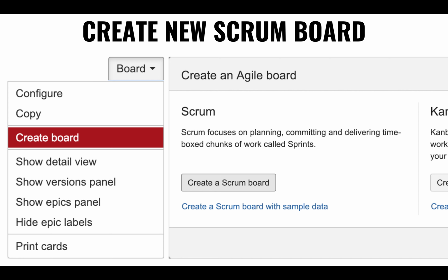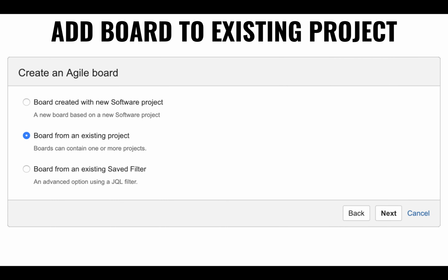Whereas Kanban is more like a flow, that as you're done, new things can come into the flow. You don't time box and say, I only have 1 or 2 weeks. It's kind of like an infinite flow of a queue, where things are removed from the queue and things are added to the queue, and it just flows continuously. Whereas Scrum says, let's focus and see what we can do in this amount of time, and let's not focus on anything else until we arrive at the end of the Scrum. So 2 different philosophies, but it's the same agile methodology.